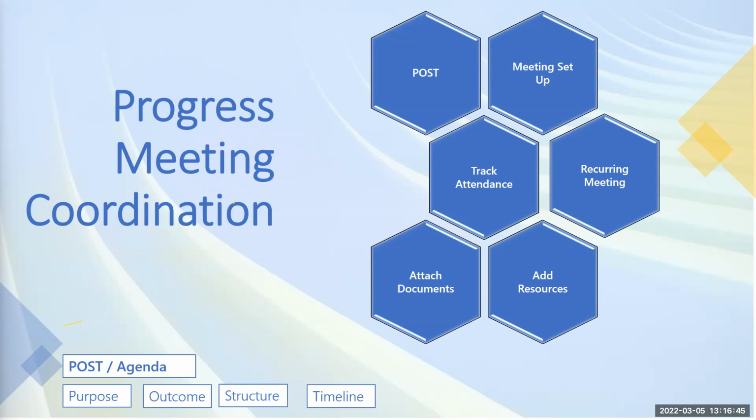Even there are sometimes when during the CAB you don't have any changes that come. Yeah, you can cancel those sessions. But once you know that these are meetings that need to happen every 2 weeks, you need to set them up in advance so that you block it up in people's calendars and be proactive about it. Check your individual invitees or stakeholders that are meant to be in that meeting and set it up maybe for the next 6 months. Just do it in the form of a recurrent meeting.